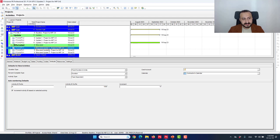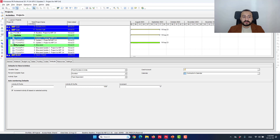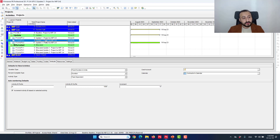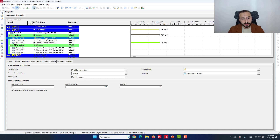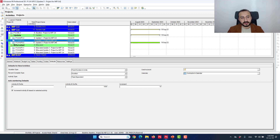What does bifurcated update two mean? I took a copy of update number one, imported the actuals from update number two and inserted them into that copy of update number one. Then I run the schedule at the data date of update number two. If you have any confusion, you can go back to the workflow. I may have made some changes in update number two, but I want to evaluate the delays before any changes — that's the purpose of the split method.